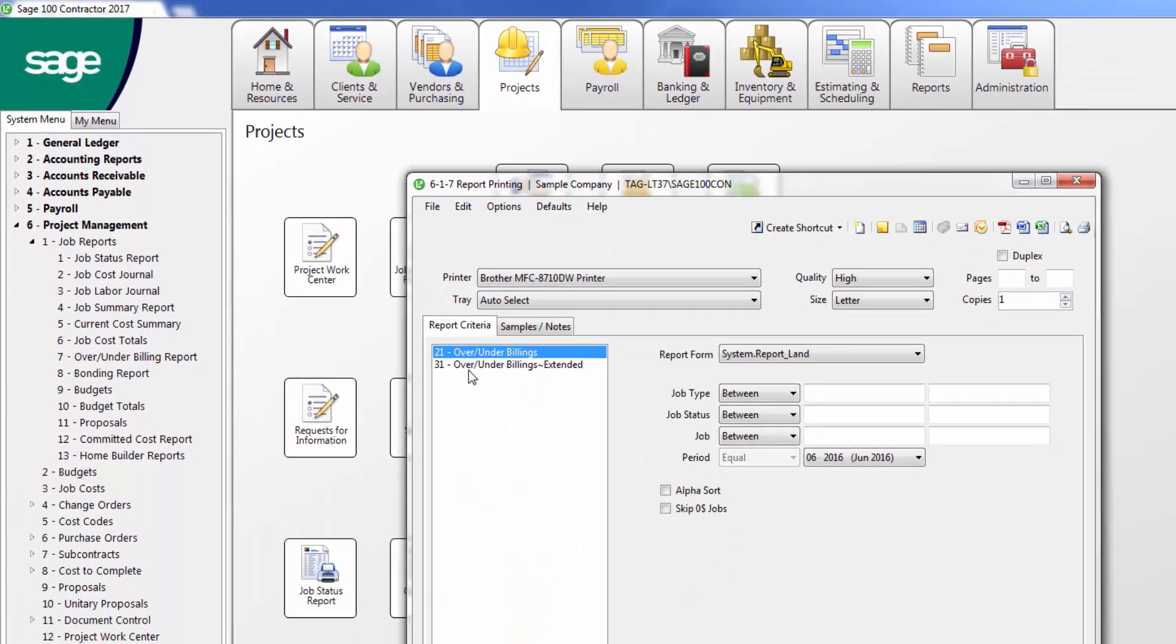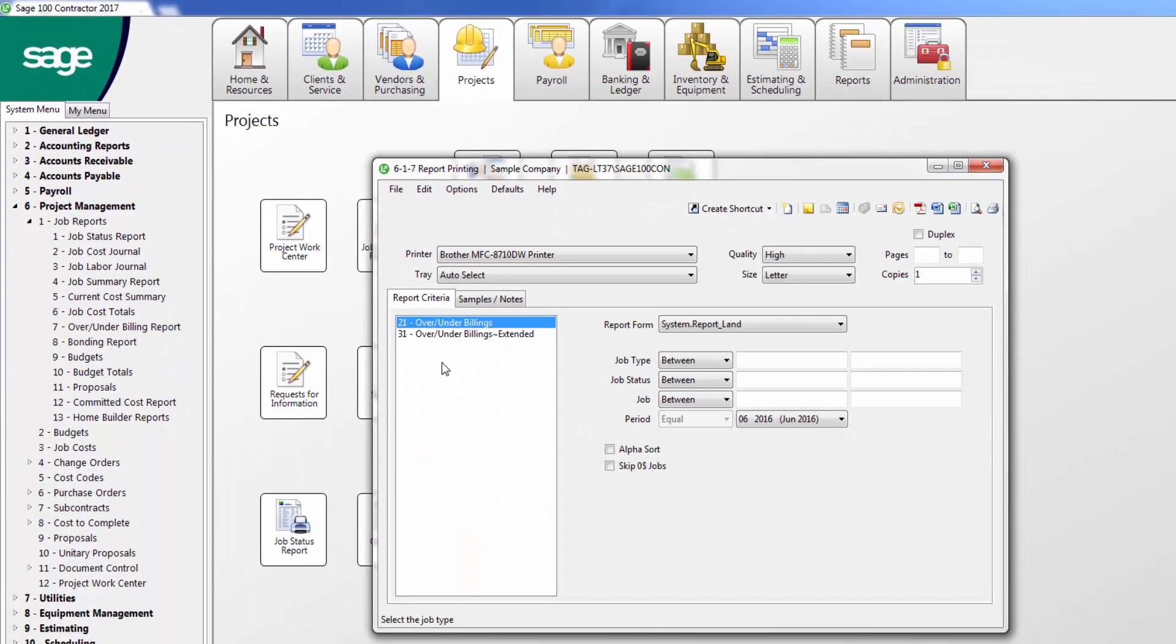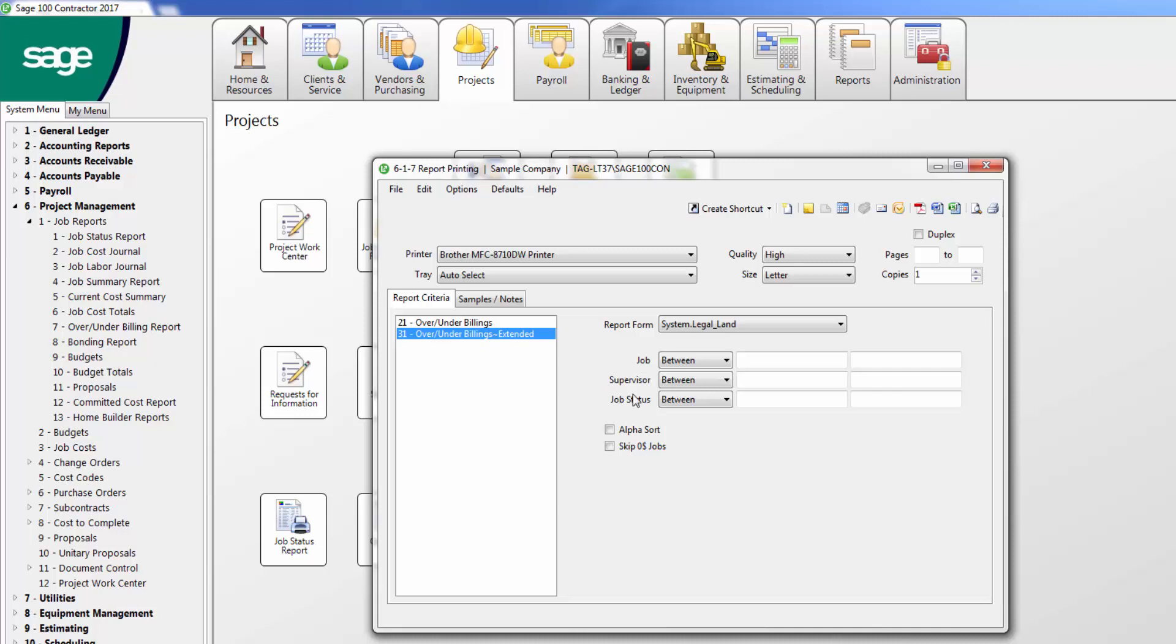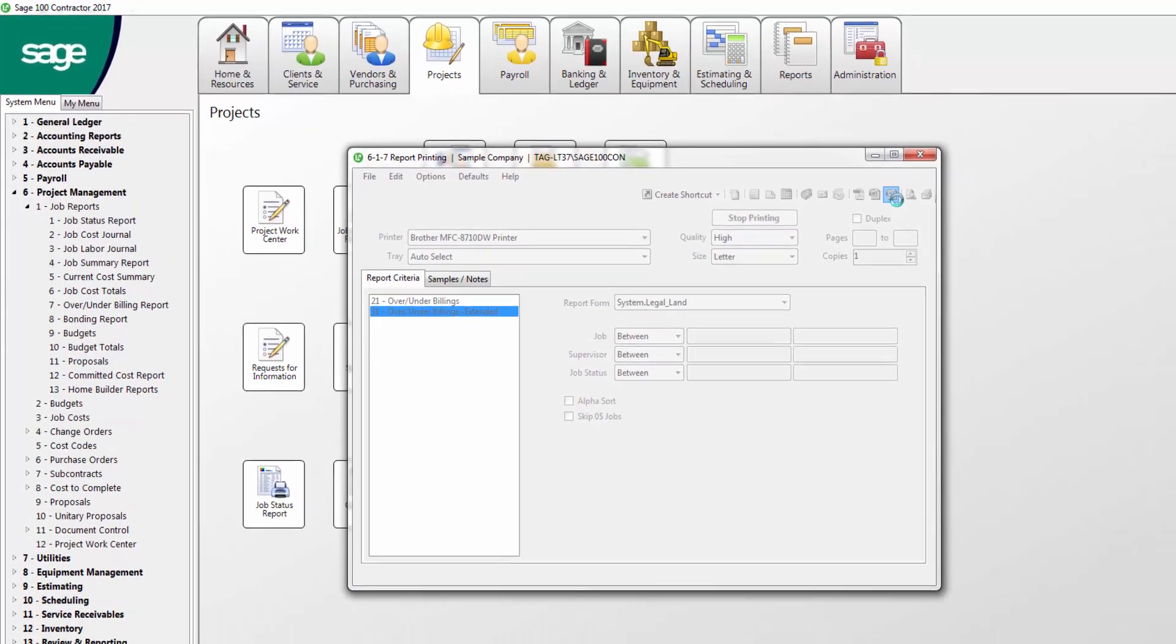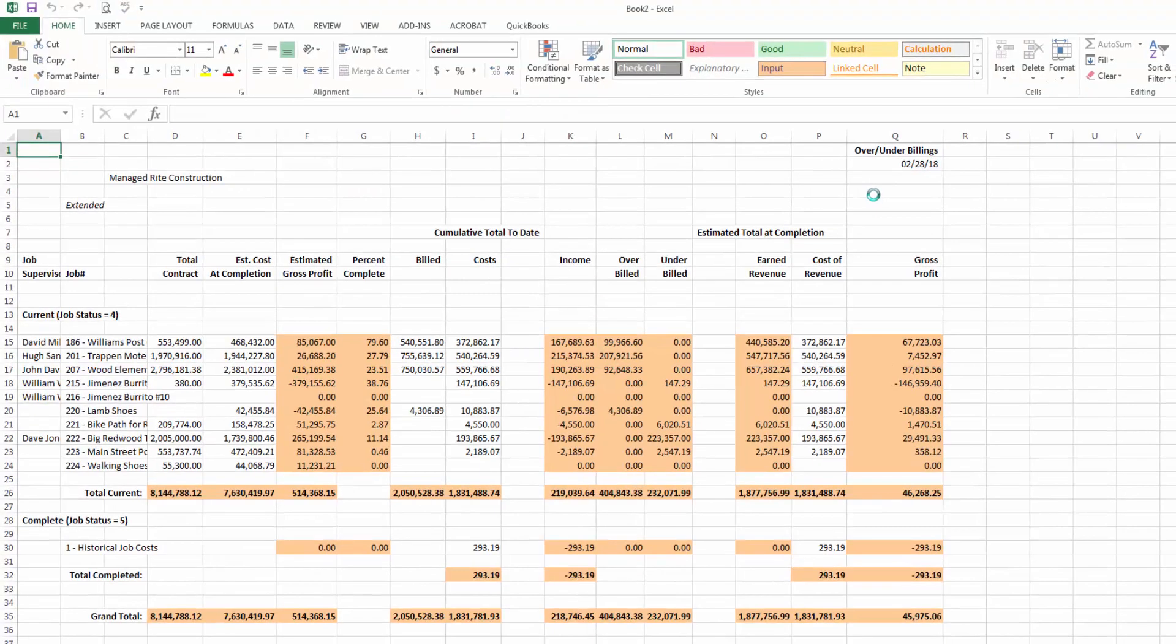I choose report number 31, which is the extended version of the over-under billing report. Instead of printing this report, I export it to Excel. This way I can modify my total costs at completion to match the amounts I calculated in the 6, 8, 1 Cost-to-Complete worksheet.